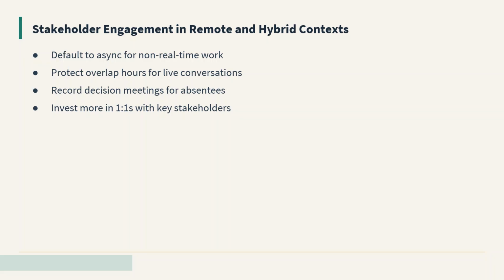Record decision-making meetings so stakeholders who could not attend can catch up without losing context. And invest more, not less, in one-on-one time with critical stakeholders, because the informal relationship building that used to happen over coffee now has to be scheduled deliberately.